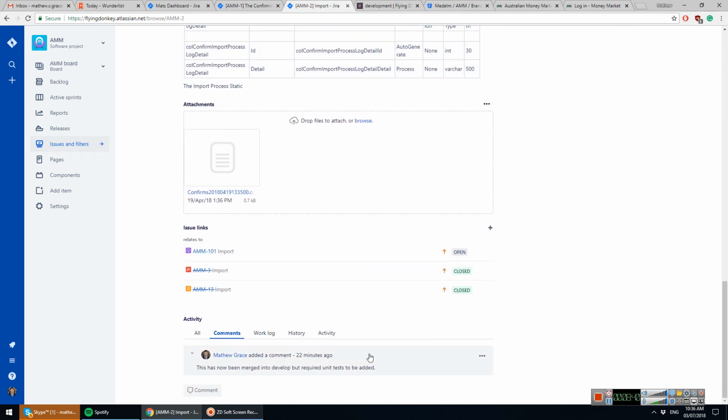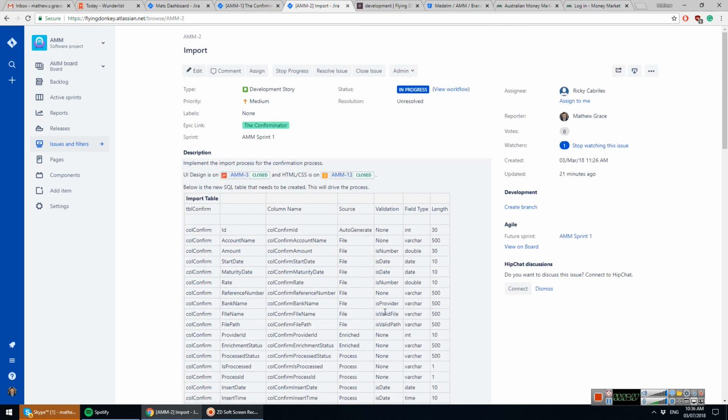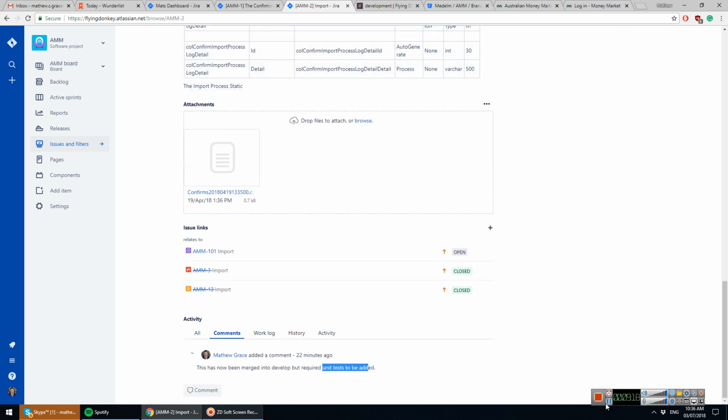Ricky should do unit tests on the branch, and then there should be a pull request review done by the developers. And then at that point, what I would expect, and we haven't quite got there yet, is some sort of testing to be done by you on the branch as the BA to make sure that the functionality you specified is now working. We will have various servers running, and there's various things that we can do to deploy a branch. So the idea is it deploys into the web and then you test it and give feedback to the developers.